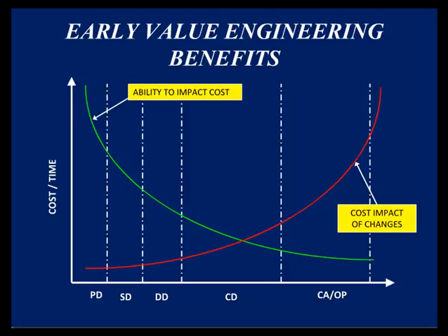You get a lot of dominoes on the table very quickly, and by the time you move into construction documents and start moving toward construction, those dominoes are all lined up in a neat row, and interrupting any one of them can knock a lot of other dominoes down. So making even very insignificant changes late in the process can trigger changes to many, many sheets of work and impact a lot of other consultants who are involved in the project. So the value of engaging with the contractor early in the process allows this value engineering to begin when you're still in preliminaries and schematics, so that the effort can be much less intensive as you move through CDs.